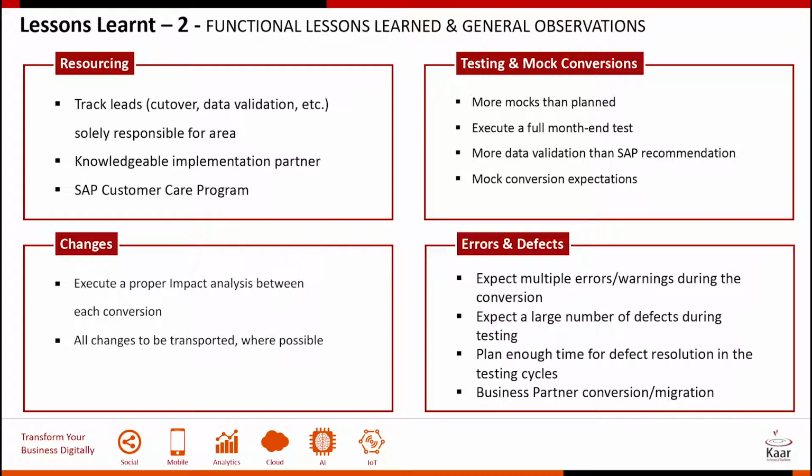Testing and mock conversions. Have a very clear-cut testing strategy, testing plan. Try to include all the important scenarios in your testing strategies. Have more mocks than you think is required, and execute a full month-end test in your mock conversions. Have more data validations, and set mock conversion expectations, because when you say run about 4 or 5 mocks,